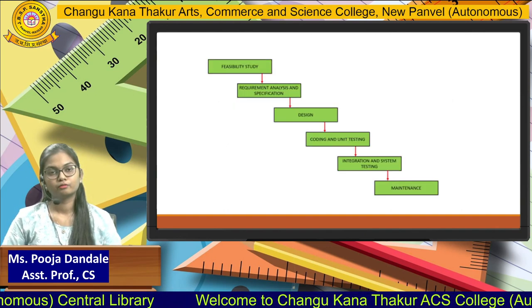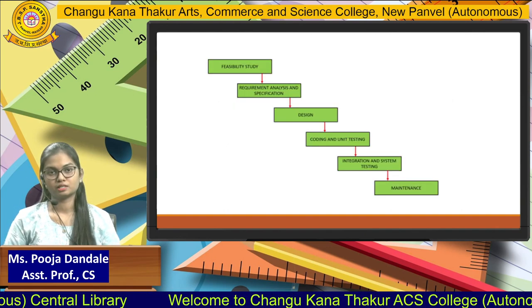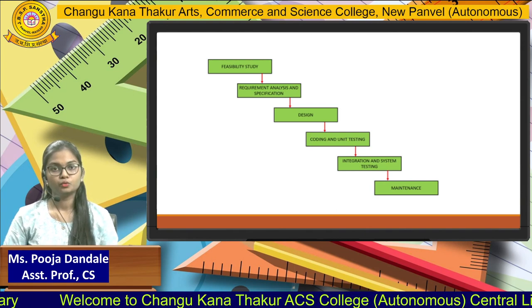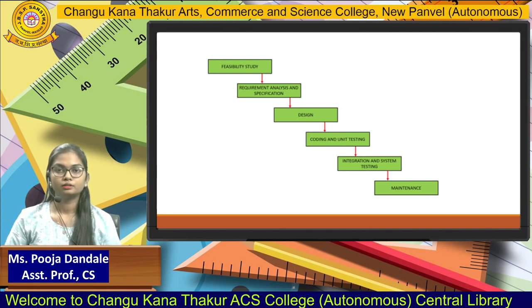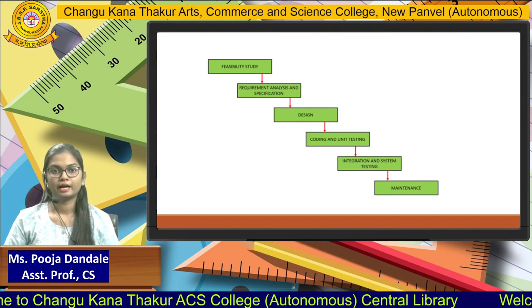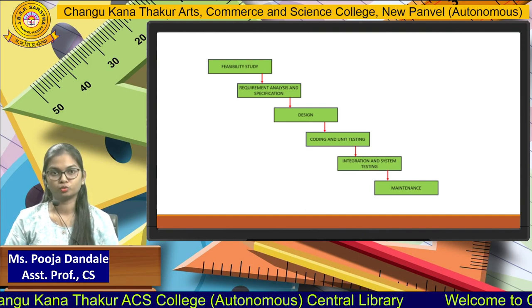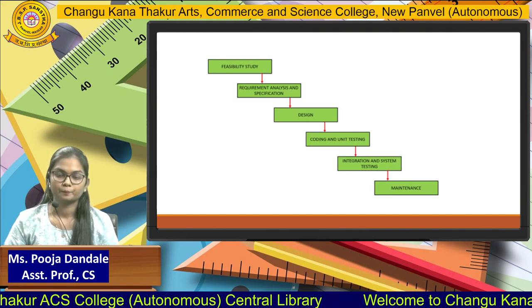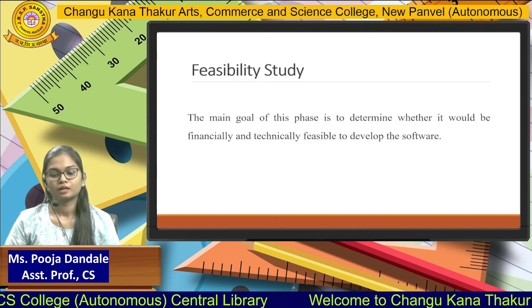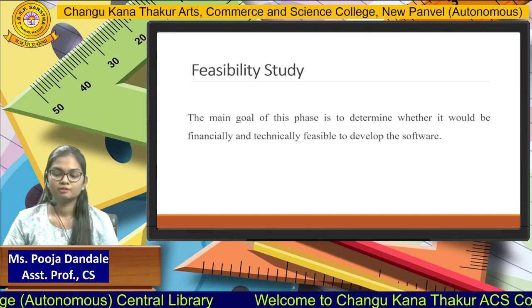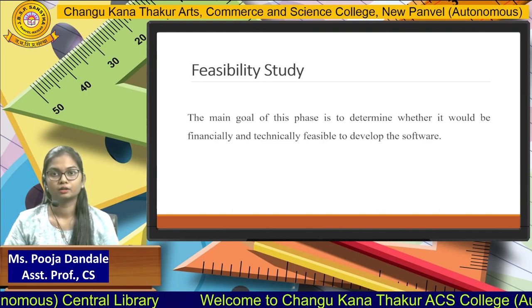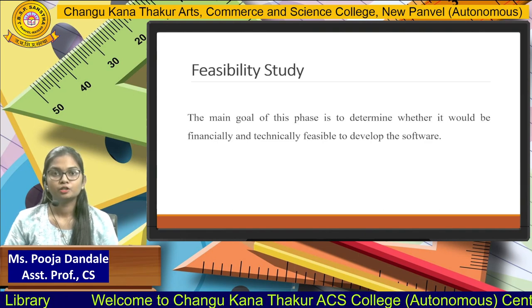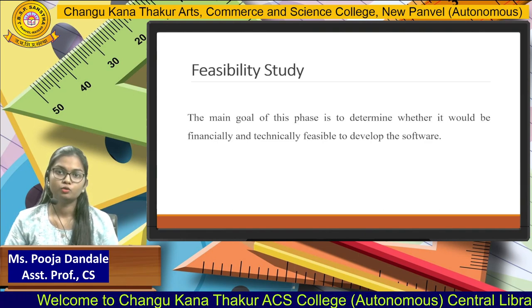We'll go through these phases one by one and see how the waterfall model actually works. On the screen we can see the waterfall model and its different phases. The first one is the feasibility study. The main aim of feasibility study is to determine whether it would be financially and technically feasible to develop the product.